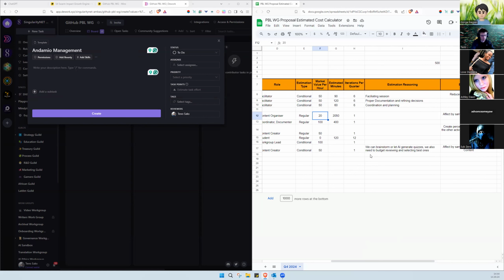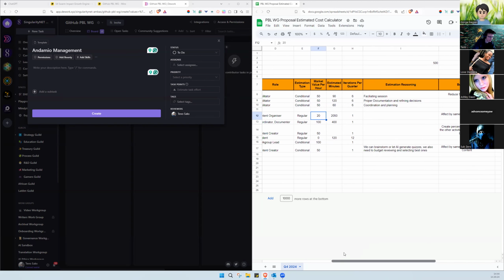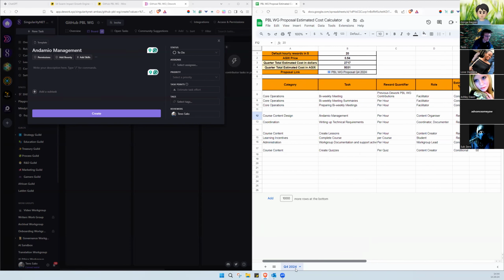But if two people both provide 10 hours, they would both get $100, which is effectively $10 per hour instead of 20, because they went over budget. This protects us from going over budget and leaves funds for other activities. Yeah, that makes sense.